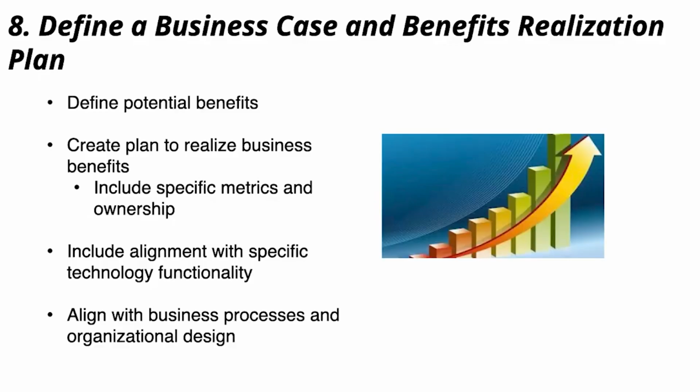And then defining a business case and benefits realization plan. The one thing I'll just add to this, even though I sort of alluded to this point already, the one thing I would say is when you create a business case to take to your board or to your management team to justify the project, which hopefully you're doing, then you want to make sure you're not just being overly optimistic and putting in numbers that give you the answer you're looking for.